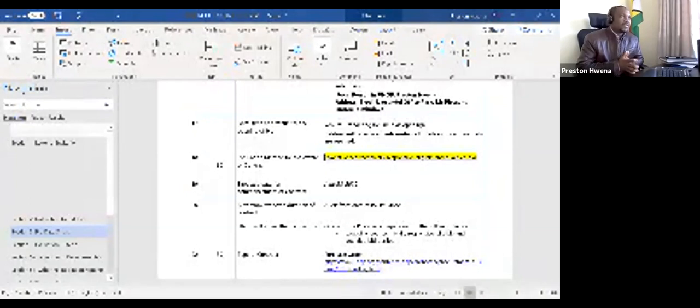We don't have any more time to waste waiting for deliveries. So if you are a manufacturer, the better, because we can consider batch deliveries. If you can manufacture 1,000 units every day, better deliver those 1,000 every day until the consignment is delivered in full.